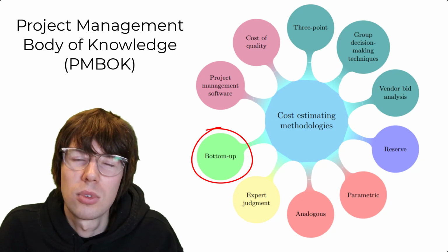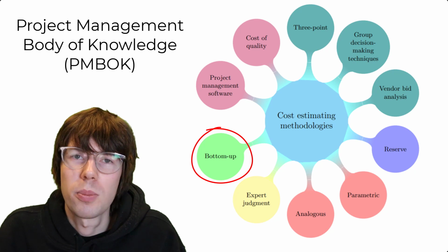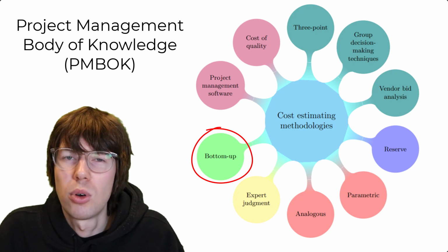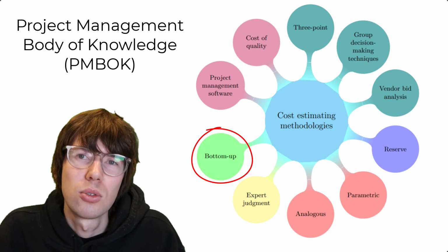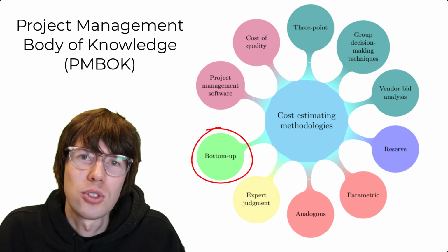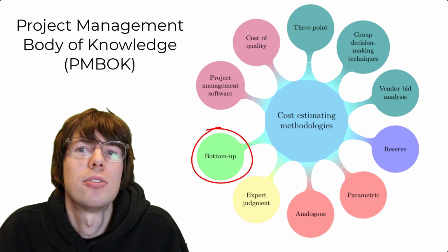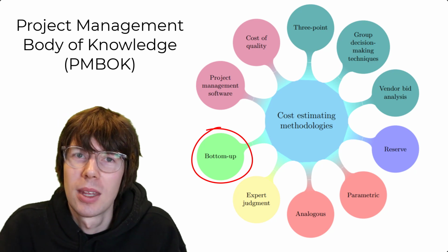The bottom-up approach does not tell you how to actually estimate the cost of the work packages. So instead, you will have to rely on some of the other methods. Therefore, it's not an independent method. Usually what we do is just apply expert judgment. If you are an expert, you consult your intuition to feel your way to figure out the cost of this particular work package.